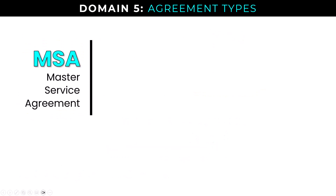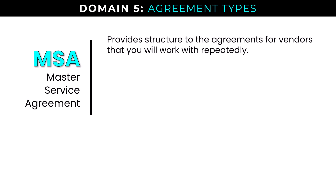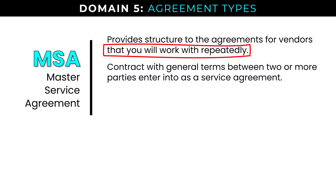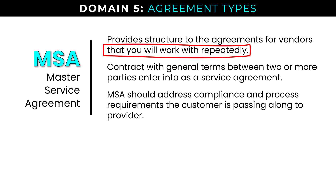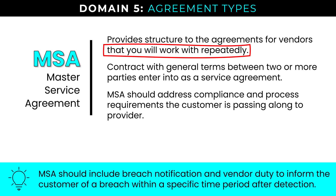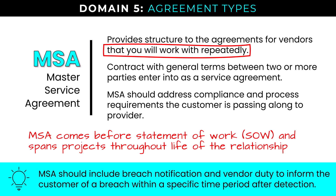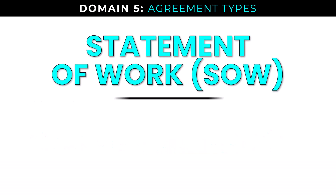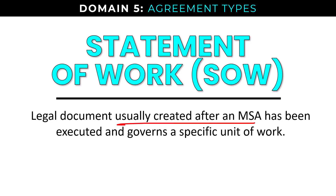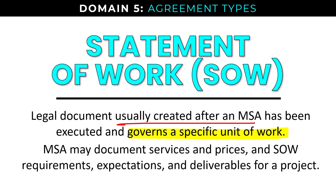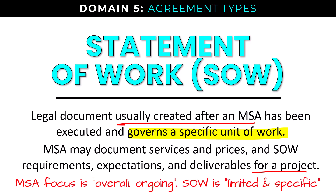The Master Service Agreement or MSA provides structure for agreements with vendors worked with repeatedly. It's a contract with general terms between parties entering a service agreement, addressing compliance and process requirements, and should include breach notification requiring the vendor to inform the customer of a breach within a specific time period after detection. The MSA comes before a statement of work and spans projects throughout the life of the relationship. The Statement of Work or SOW is a legal document created after an MSA, governing a specific unit of work — the MSA is overall and ongoing, while the SOW is limited and specific.